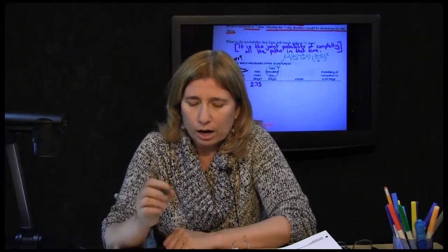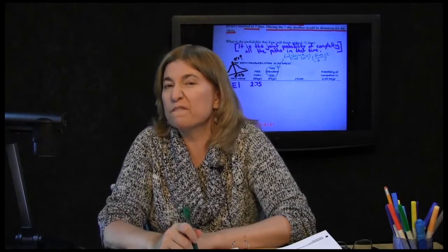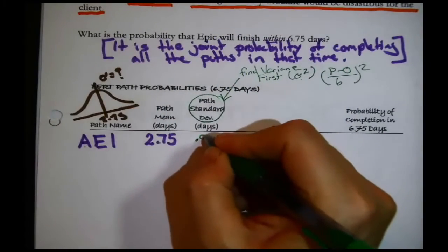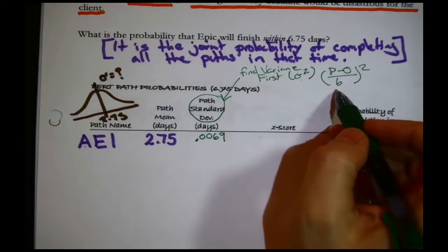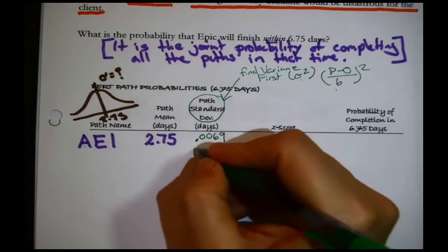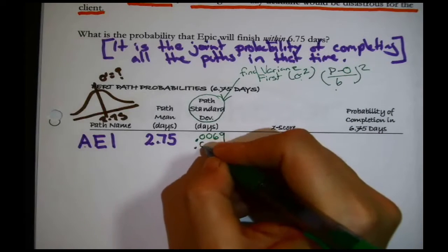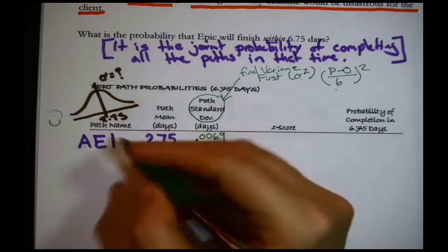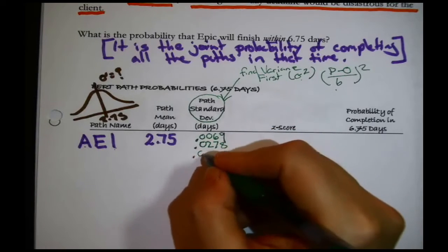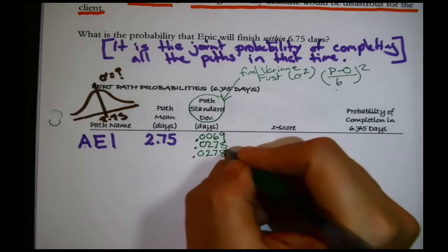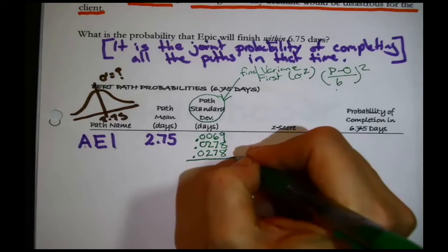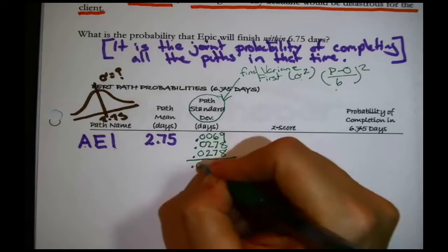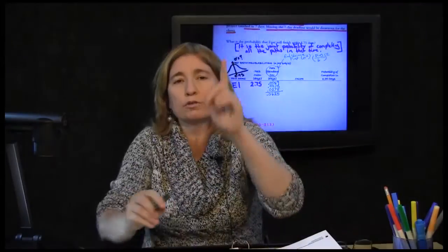For instance, I'm checking my work and I remember that the variance in task A was 0.0069. That's what we got when we filled out that formula. Then the variance in task E was 0.0278, and then the variance in task I was 0.0278. Why am I lining these all up in a stack? Because I want to add them. I add them up, I get 0.0625, and you say, great, are we done here?